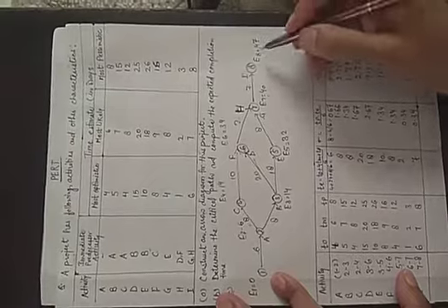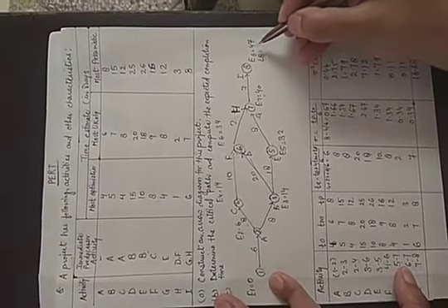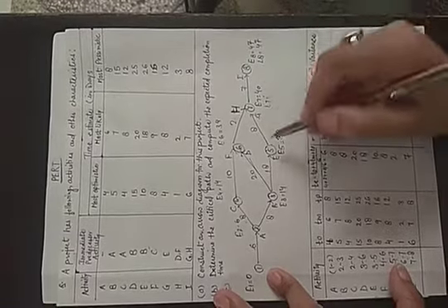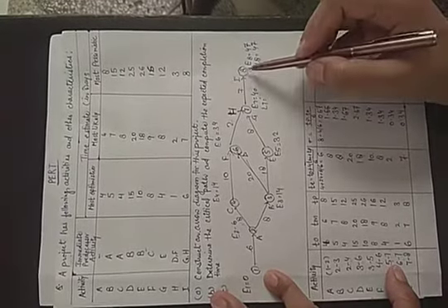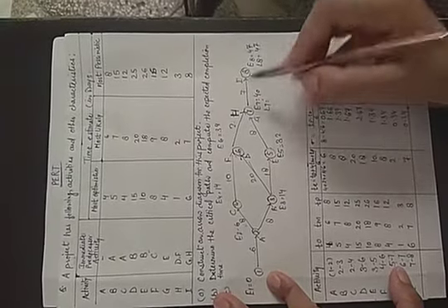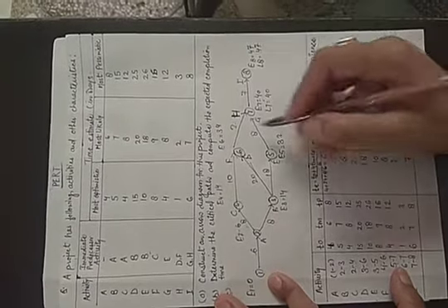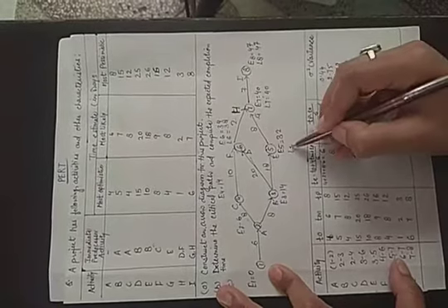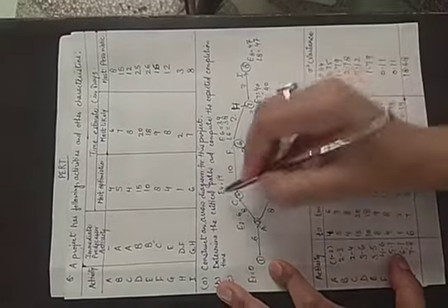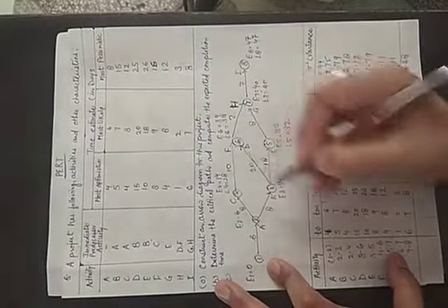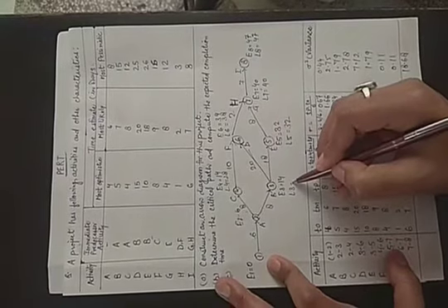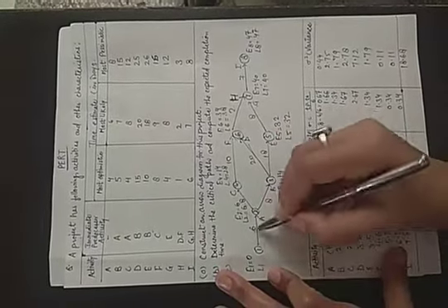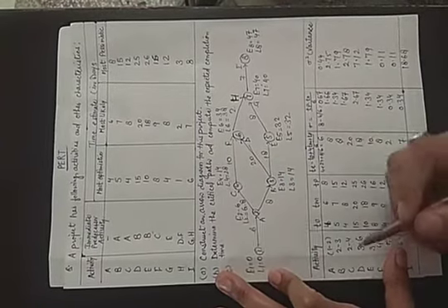Now we will find out the latest finish time. L8 is equal to E8, which is equal to 47. For L7, in the backward pass calculation we will subtract the corresponding activity time. 47 minus 7 is 40. Then comes L6. L6 is equal to 38. L5 is equal to 32. L4 is equal to 28. L3 is equal to 14. L2 is equal to 6, and L1, 6 minus 6, that is equal to 0.